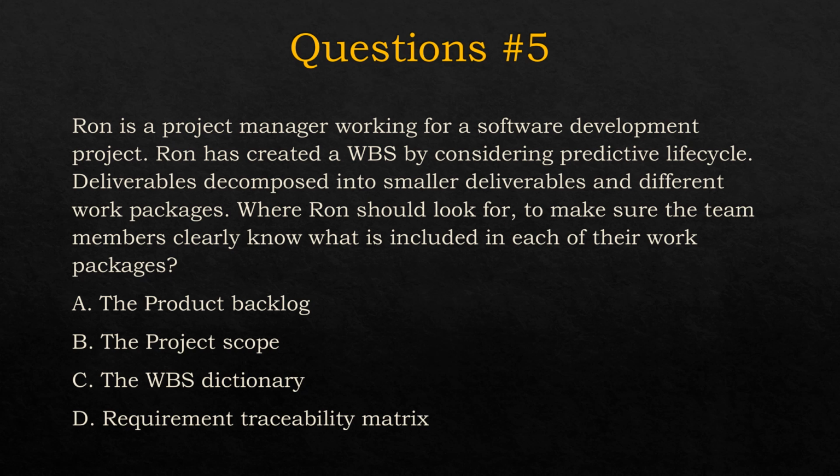A is not the right answer because this is used in Agile, and we are using predictive as per the question. B is also not the right answer. Why? Because the project scope is not the place where we look for work packages. So the right answer is C. We always look to the WBS dictionary for work package information.